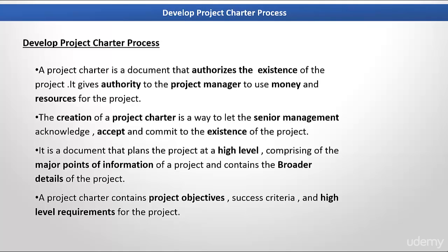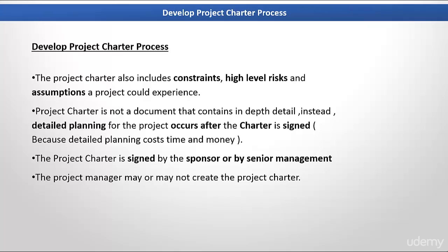A project charter contains the project objectives, the success criteria, and the high-level requirements for the project. So this should give you an idea that anyone who reads the project charter can immediately get an idea of what the project is about and what are the most important things to know about the project. The project charter also includes the constraints, high-level risks, and assumptions that a project could experience.